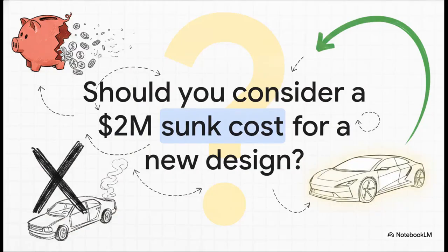But here is a massive trap that trips up so many decision makers: sunk costs. Listen, if your company blew $2 million on a prototype that ended up failing safety tests, it should absolutely not dictate your economic decisions for a new design. You have to completely ignore it. That money is gone. We evaluate the future, not the past.